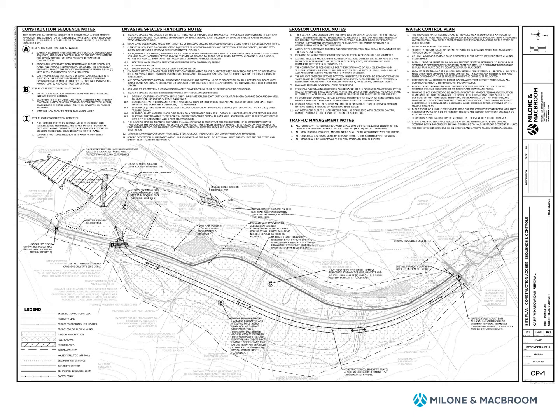I'd like to point out that all access will need to be through the existing gravel access road. No access directly to the dam will be allowed directly from Bull Run Road. Most of the sediment to be removed in the removal area is now dry and can be accessed by installing culverts across the existing channel and crossing. A lot of the excavation can be done, leaving the flow in the current channel for the first phases of removal.